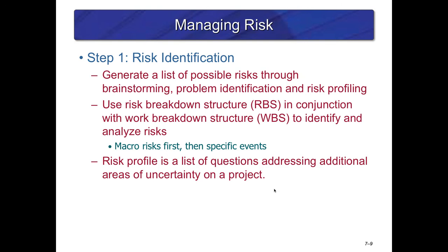Like 1 to 100, or a percentage? How much? A percentage or a number? Yes, percentage. I would say maybe less than 5%. So let's use 5% because it makes the math easy. Okay, so you take the 5%, you multiply it by the $6,000 you said would occur, and therefore the cost of that risk would be about 30 bucks.